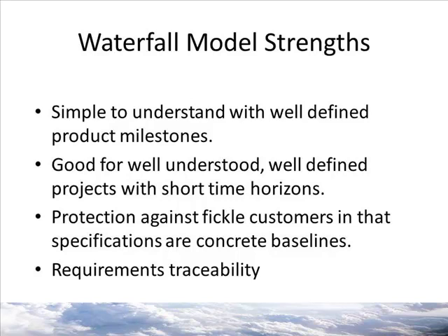It was really great for well-understood, well-defined projects with short time horizons. It was also protection against fickle customers in that specifications are concrete baselines that you had to perform to. So if you got to the end of the coding phase and the customer said, hey, I want this and this and this instead, which customers often do, you could go back to the beginning and say, wait a minute, these are the requirements that you signed off on and agreed to, and that's not part of it. If you want us to change something, it's going to cost you more money.